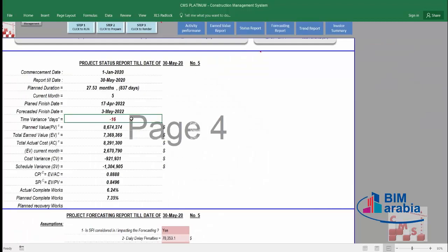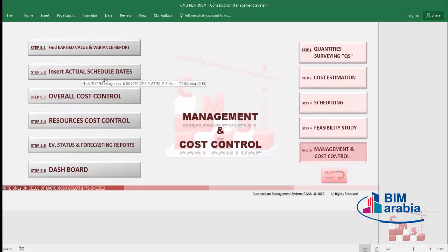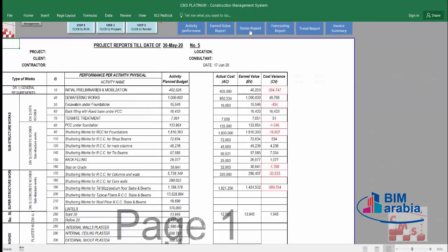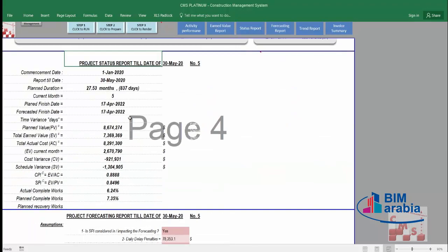And you decide to mitigate and recover this delay by crashing the project and updating your program by starting the block work in its planned time. So you will start the block work on the same date of the plan, which is 22 June. You will find here the bar chart will be returned back. And also when you go to the status report, you will find no delay now. And here you will consider that you apply a mitigation, and you will find